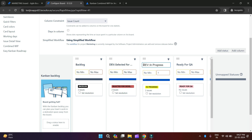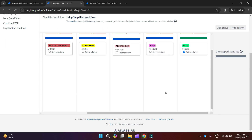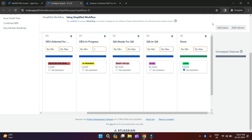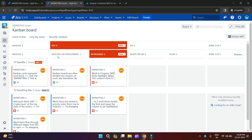I am prefixing the column names like this, and for 'Ready for QA' I will write like this. Then I scroll horizontally for the QA column. Now I go back to the board, and here you can see the two columns selected for development and In Progress are combined inside the dev column. Similarly, Ready for QA and In QA are combined under the QA column. This is how you can combine columns on your board.